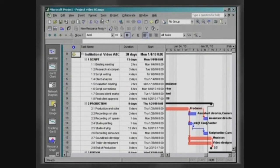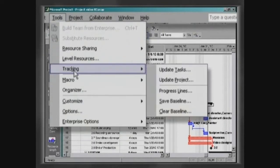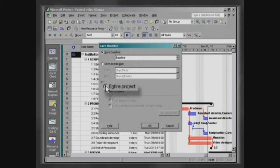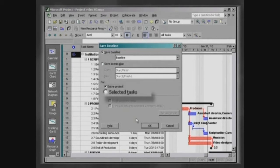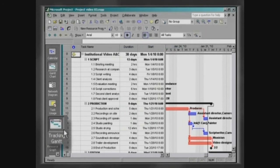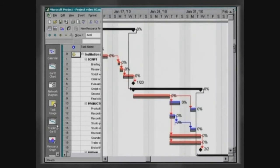Click on Tools, Tracking, Save Baseline. Choose Save Baseline and define if the saving command for the baseline should apply to the entire project or just to the selected tasks. In the Tracking Gantt view, a static bar can be observed under each activity. This is the baseline.